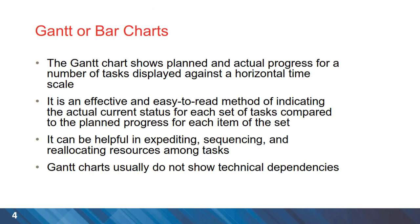For visualization purposes, we can see the planned and actual progress for different tasks or activities on the Gantt chart. It's a very easy to read method for visualization and showing the status of different activities and a very useful and quick source of information when it comes to crashing or expediting project activities and also reallocation of resources to different tasks.